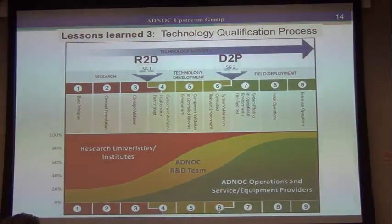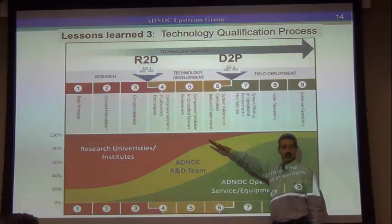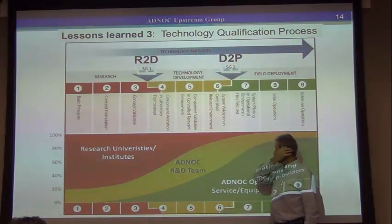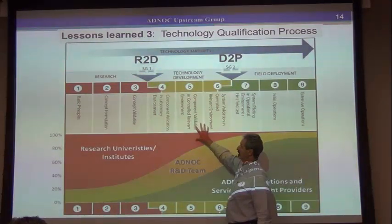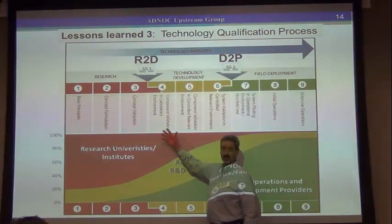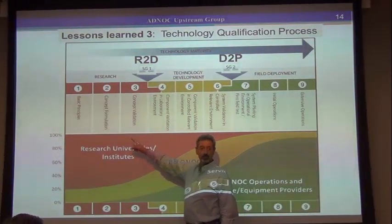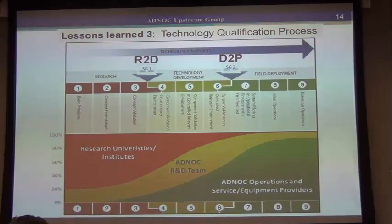It's true that, to not overload the picture, what happens from 1 to 7 is risk goes down. You need to design it so that risk goes down as you get to 7. Okay? And a lot of projects will not even pass stage gate 1. Don't talk about falling in the valley of death. Simply because there's still a research product. But manpower, you can have one person in 1, 2. When you start getting 4, 5, 6, no, it's a team. It's hardware. It's qualification. Much more expensive. So yeah, I would say 10 to 100 times more expensive than a single man show here.